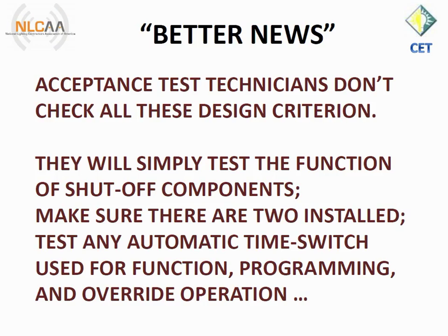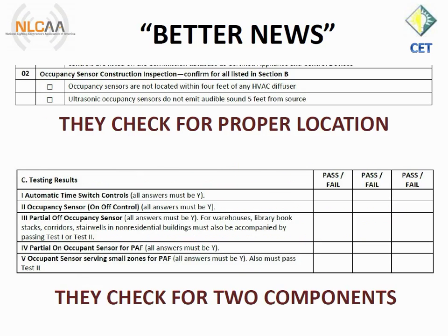that you have manual dimming operation for dimmable luminaires in these areas, and they don't have a check off on the form for is the area control in the area with the controlled lighting. However, they do have it for timer override, so watch that. Note that controls for areas complying with section 130.1 Charlie 6 are treated differently in the final pass-fail. So you must have 2 shut-off controls if you are in an area stipulated under 130.1 Charlie 6.